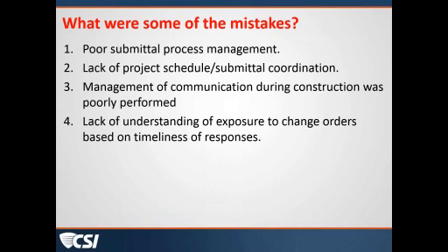One comment. I'm sorry, go ahead, Matthew. I was just going to say there was a comment that just popped in here from Chuck Coleman. He said that he thinks the extenuating circumstances would inform the action to be taken in response to the circumstances on the field. It strikes me as unreasonable to delay the installation of the waterproofing until the submittal is returned to the contractor. That sounds like a lead-in to a delay claim. Quite possible. Go ahead, Doug. Yeah, that is quite possible.